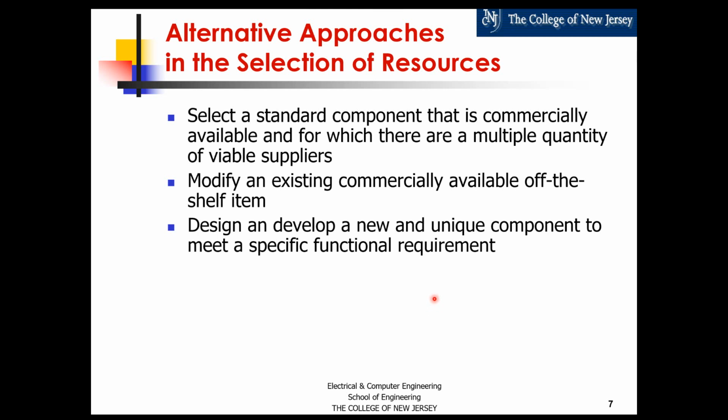So you are required to do something custom. On the other hand, it's going to take you longer. There are such things as marketing windows where you actually can benefit greatly from getting to market faster. So part of your plan, and this gets more into the program management aspect of product development, is you may have a hybrid. You may come out to market and not make so much money, or even lose a little early with off-the-shelf components, and then as you grow the market, go and do a cost reduction that includes custom development of critical components.